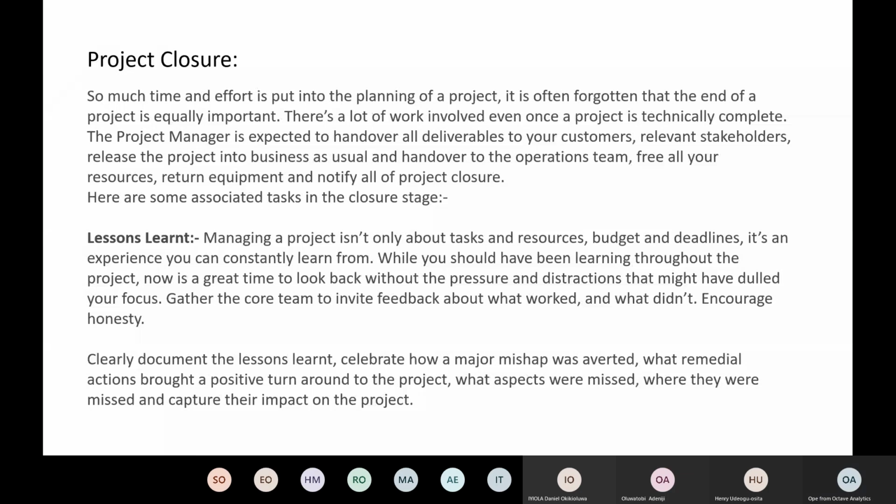So you should be able to ensure at the project closure stage, and also show with evidence, that all the client data resource on your laptops has been deleted, has been taken out, and there's no showing of leakage. There's no possibility of data leakage of their data.